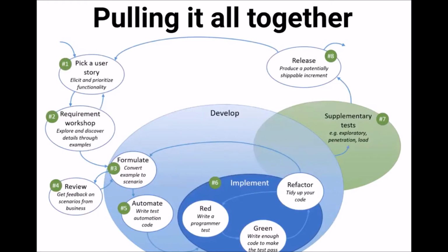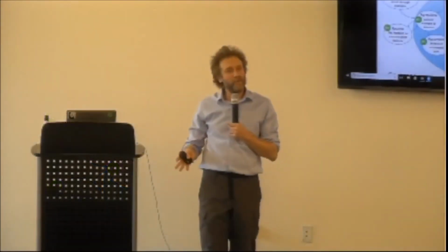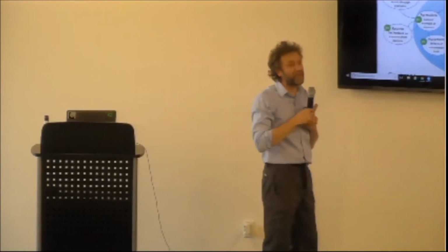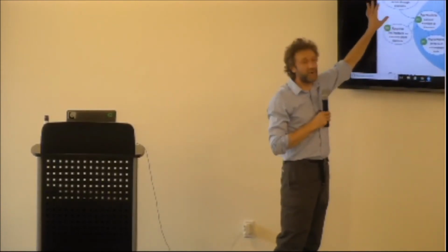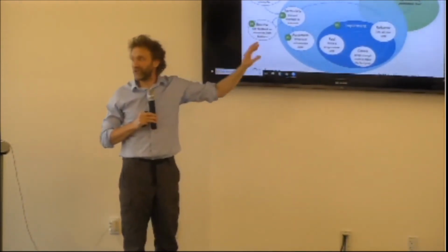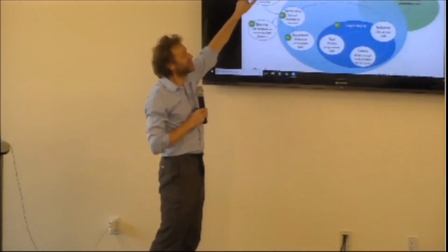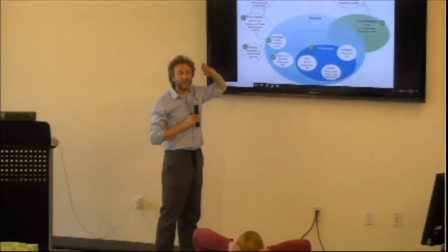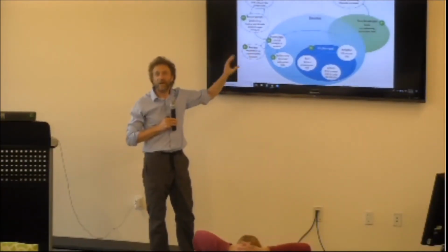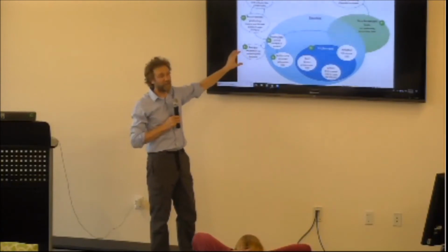So we've got a requirement workshop, which roughly maps through to maybe refinement or grooming, depending on what language you want to talk about. It's an example mapping session, basically. We suggest you run these regularly, keep them short, because we love short meetings, right? We hate long meetings. So we want lots of short meetings where we can build out these example maps, ask questions about things that we don't understand, make sure that we really understand the requirements.